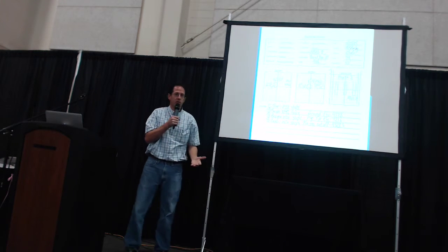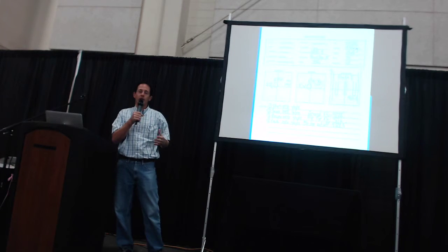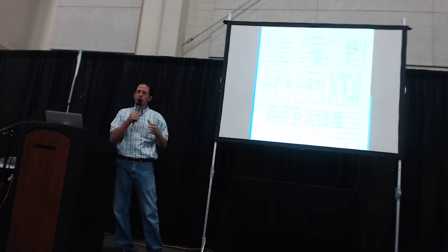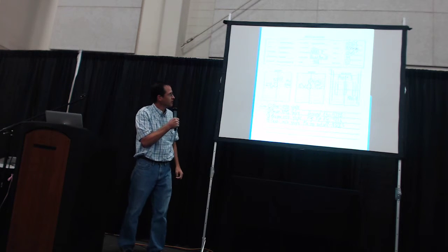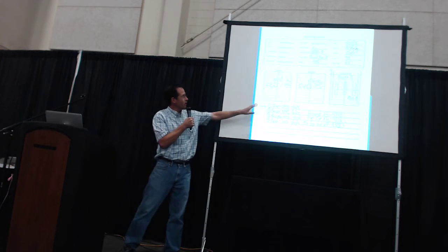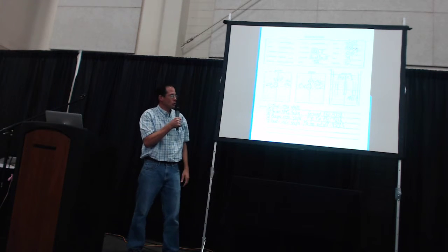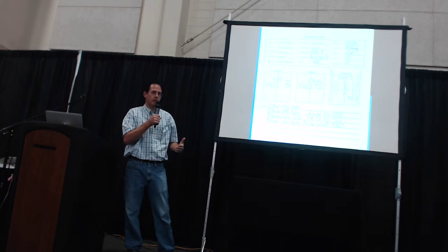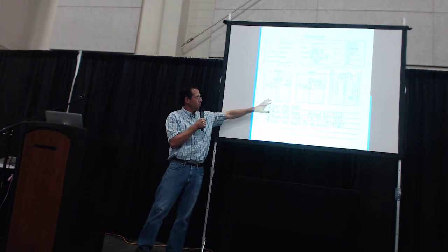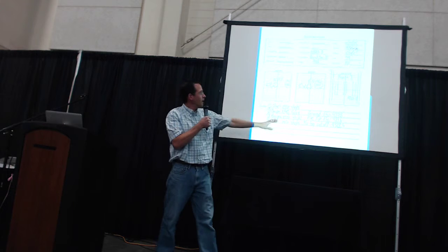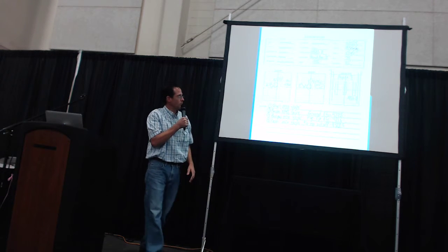So now the 7 inches is out of the tolerance zone, and so a penalty now does apply in this case. So the plumbness, it can be out as much as 2% before a penalty starts to kick in. So in this case, the plumbness would be fine, so there's no penalty applied. But the pile center is out, so a penalty does apply.